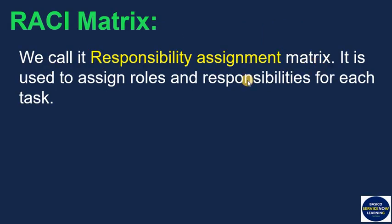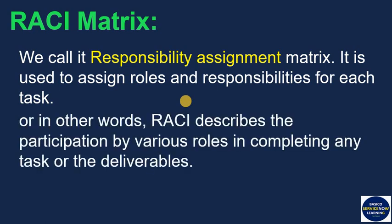We call it Responsibility Assignment Matrix. It is used to assign roles and responsibilities for each task. For example, there is a task for test case creation — who will take ownership, who writes the test case, who provides the requirement, whom to provide the status. RACI matrix is basically used to assign those roles and responsibilities. RACI describes the participation by various roles in completing any task or deliverables.